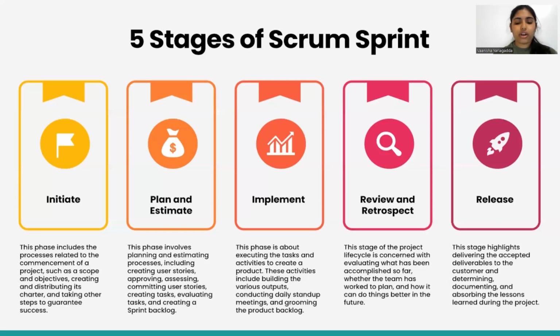Work is first organized into Scrum sprints, like two to four week periods. These sprints end with progress in the development of the product. During this phase, the Scrum development team does sprint planning. The team identifies which user stories they would like to work on during the sprint. This is called the sprint backlog.